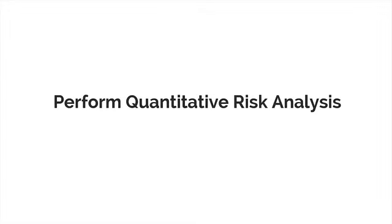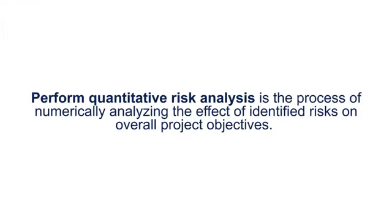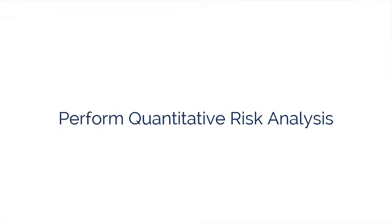The fourth process of project risk management is called Perform Quantitative Risk Analysis, and it's the process of numerically analyzing the effect of identified risks on overall project objectives. This process is performed on risks that have been prioritized by the preceding process, Perform Qualitative Risk Analysis, and you have determined that they are or can potentially and substantially impact the project. This process analyzes the effect of those risk events.